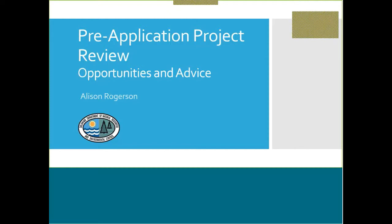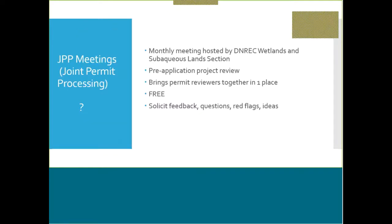So just to get started, I'm going to ask the panelists that I have on today to introduce themselves in just a minute. But to get started, what is a JPP meeting? This is a monthly meeting that's hosted by DNREC, hosted by the Wetland Subaqueous Land Section, and it is an opportunity for a pre-application project review. So you've got some of your components put together, but you haven't submitted your application and paid your fees yet. It brings all of the proposal reviewers into one room at one time. You are in the spotlight. You get to present your information. It's free. And you're going to solicit feedback.